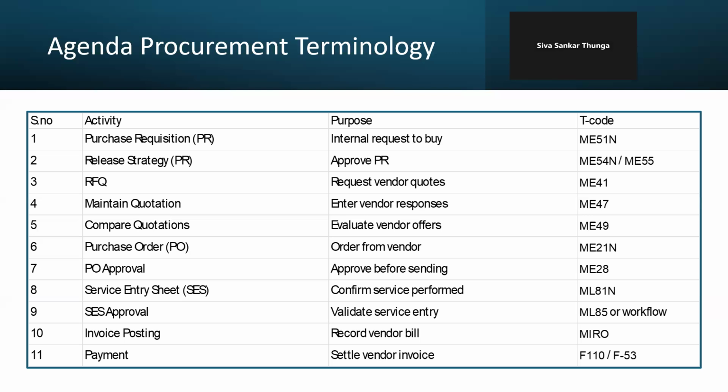You can create this automatically from a network activity, or by using a WBS element, you can procure the material by creating a purchase requisition from the ME51N transaction code. This is an internal document which will further go for an approval cycle. It will be created by the project material planner as per his requirement, maybe for the next one or two months of planning. Accordingly, he will plan to buy some materials or services.